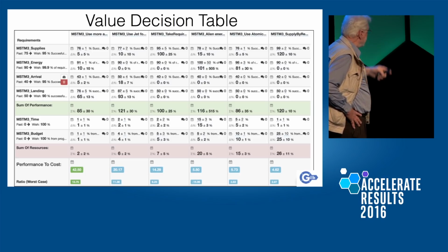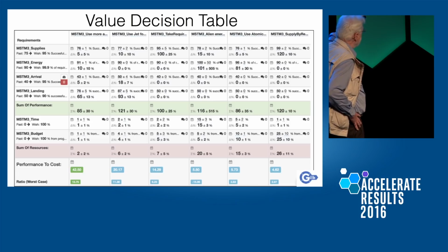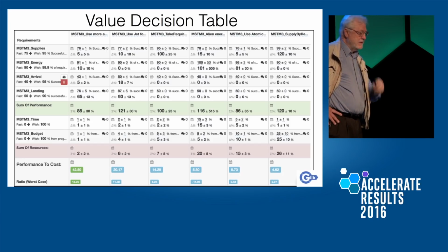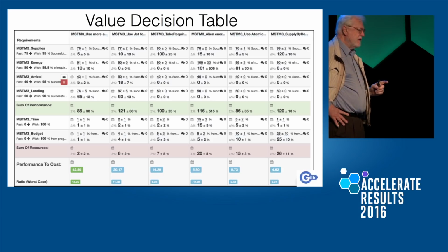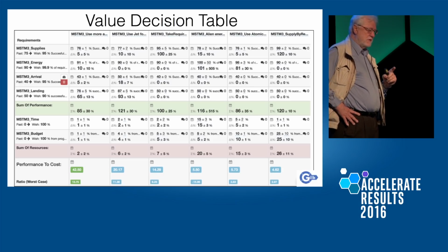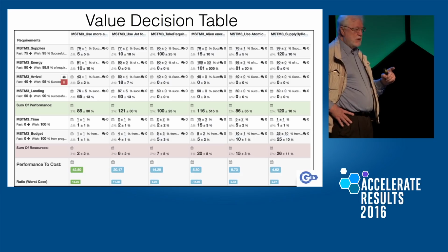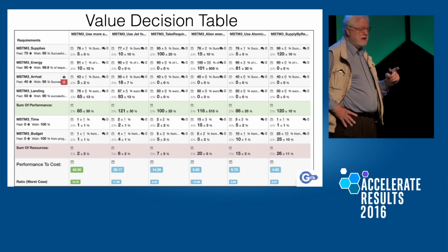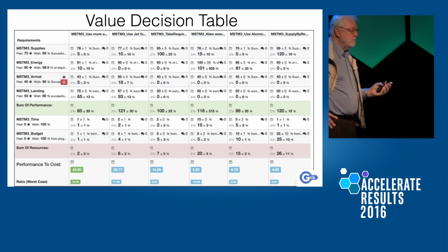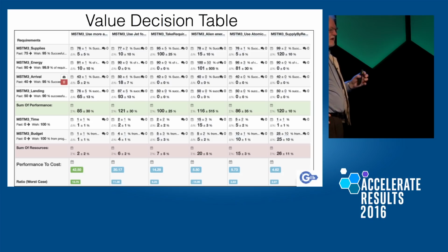On the left-hand side are some of the objectives of the mission, and they're quantified. The wish level, with wish 90, wish 95, is actually the level they wish to achieve. Wish means we haven't got the architecture, we're not sure what the architecture will cost, therefore we can wish for this level, we can value it, but we cannot state it as a goal. Goal means committed, and we know we have the architecture, and we know they have the money and resources to do it. This is about setting expectations at different stages of what we can really do. Anyway, they have some goals there.